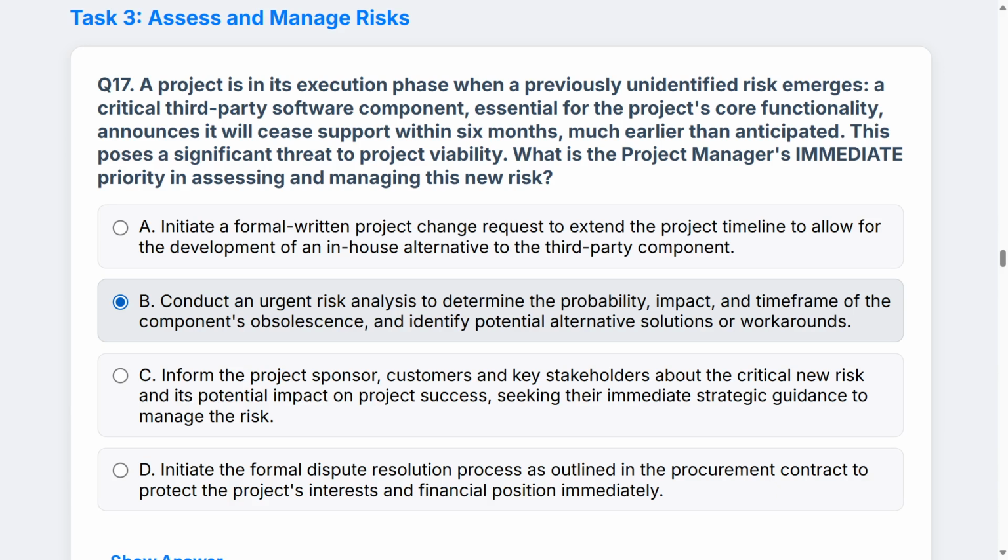All of these are important, critical for your journey in risk management, and skipping any of these could lead to you getting a question wrong. So you have to mentally go through, have I done this? Have I done this? Have I done this? When you are good with understanding what I call the A-team: avoid, transfer, escalate, accept, mitigate, and the EASEE, which is escalate, accept, share, enhance, exploit.